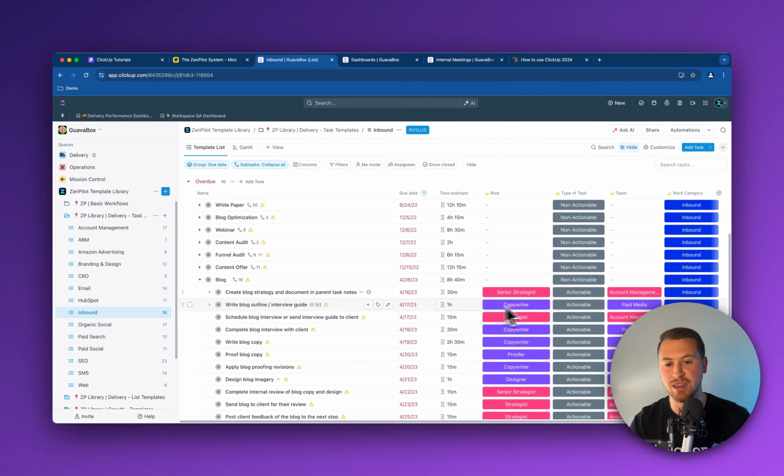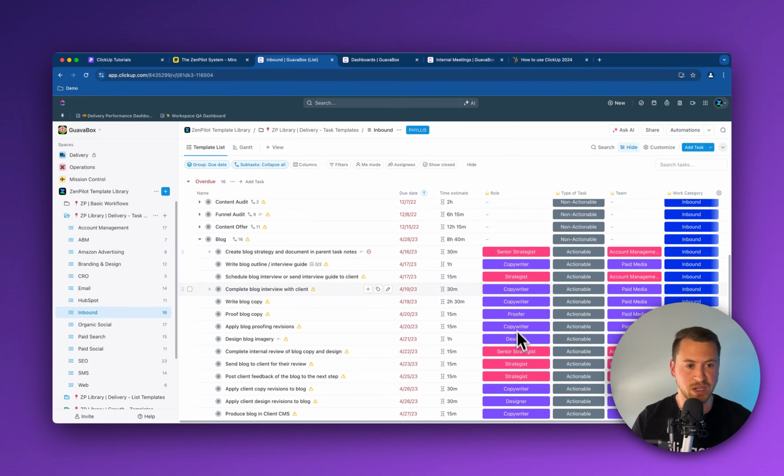Again, that'll then be in the future. I'll use that to assign the work out to the copywriter for that client. And in addition, I can use this to tell me, hey, we have 80 hours of copywriter work, but only 40 hours of copywriter work on the team. So maybe I need to bring on someone new, or maybe I need to bring on a contractor. I can use that to make good, smart resourcing decisions. So make sure you get that in there.